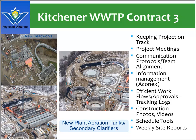These are just some of the best practices from the construction side of things. And this is just a picture of the current construction for Contract 3 of the new headworks and secondary treatment and clarifiers. Some of the good things that we looked at is keeping the project on track by having regular project meetings, a good communications protocol and management tracking system to track RFIs and approval logs, having regular construction photos and videos to see the progress, as well as scheduling monthly progress schedule meetings to then look at the resources and to help monitor cash flows.